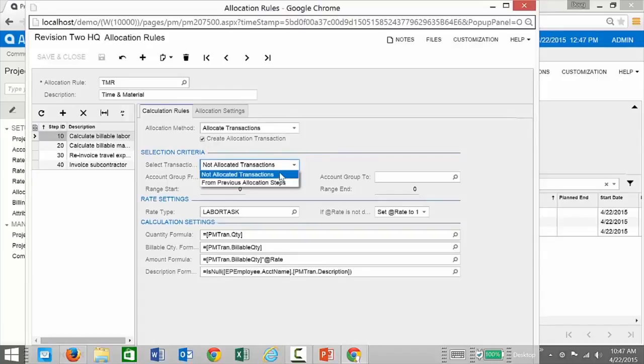You'll also notice that I can do calculations in earlier steps that are used by later steps. So this gives you the ultimate flexibility with how these formulas are created. If I want to go ahead and add a burden to my labor rate ahead of time and then use that burdened labor rate to calculate something else, I can do that. In this particular case, we're going to keep it simple and just take those direct transactions that came through from Jane Doe.